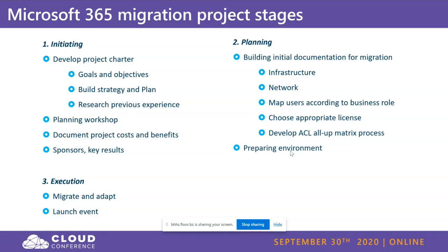That means for any execution, during the migration, it's better to split the migration into phases with pilots. I saw companies that have had 5 pilot phases, then they had, let's say, the ambassadors, and we'll go into details later, and then the migration for the whole user base. So it's very important how we are migrating, how we are monitoring the migration, and how to adapt during the migration.